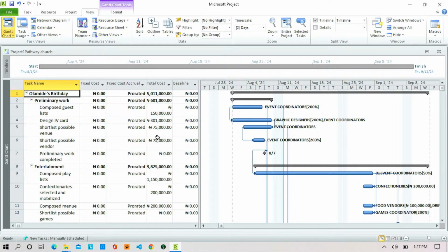Now, the defect repair is this. Joseph, in his mind, has finished the job. Let's say Joseph is the one doing the job. Defect repair. Joseph has finished the job. Emeka has done everything. Now the client comes and says, okay, Emeka, we said you should use Dulux paint. This paint is presidential. Please, we don't want this paint. Is that okay? But that change request at that time is called defect repair.